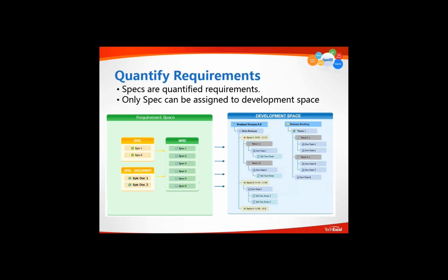So sometimes you will assign a spec into a product backlog, break it down into multiple development tasks, then estimate the time required and the size of each development task to enable the team to understand the story better before such a story gets committed into a development sprint.